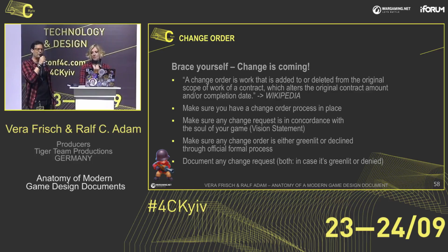also on the other hand, I've always kind of put the publisher in a bad light, saying he comes up with stupid ideas and you're forced to implement it, so make sure you get the money. On the other hand, if you have ideas, no matter if stupid or great, talk to your publisher, because you cannot just change things and then afterwards go to the publisher, look, the budget has increased because we did some changes, and the publisher is like, yeah, but I did not agree to it, how can you just change something without consulting me? And then he might not give you, rightfully in that case, the money for that change.